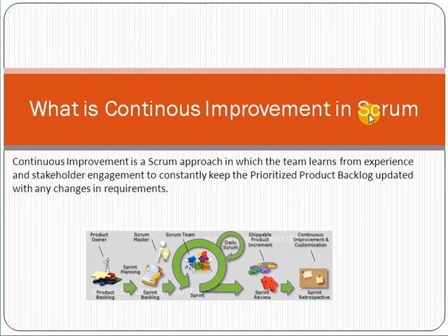Just imagine that Scrum is a sprint-based approach. A sprint is a time box of 3 to 4 weeks in which we divide the work into chunks. In waterfall, if we have to develop a project, we plan, develop, test, and then deliver.